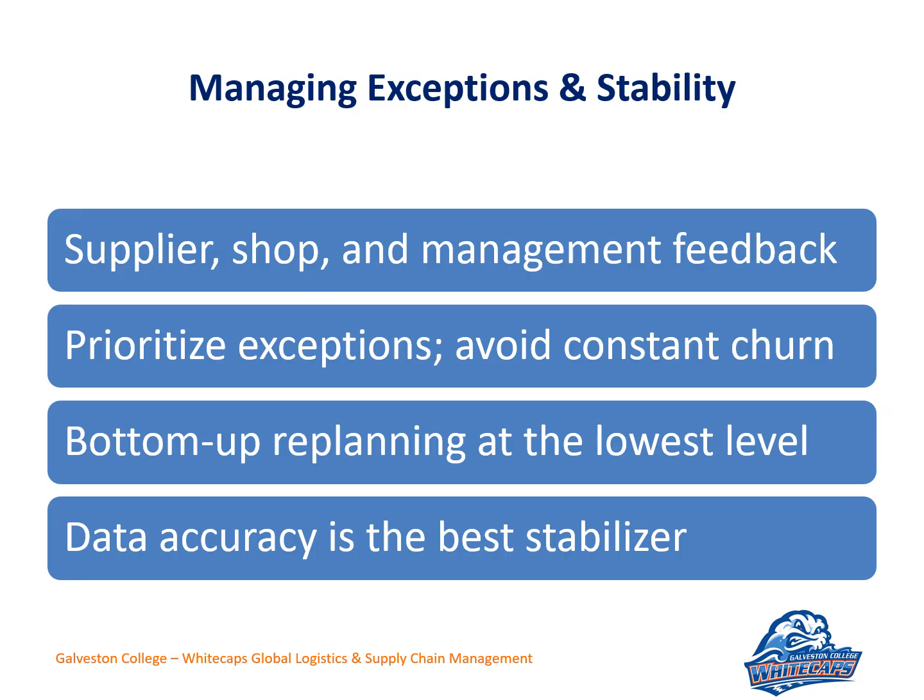And you got bottom up replanning from the lowest level, right? What is bottom up? That means you're the planner. What are you looking at when you say bottom up? You want to figure out when it's going out the door, and that way it will dictate how long your timeline is for planning. I walked into a situation where they told me that takes 6 days to build, and I said, "Oh, really? Great. We can handle that." But when I did a walkthrough, I went to the last point on the assembly line and walked forward to the first point. And I learned, no, that takes 6 weeks.